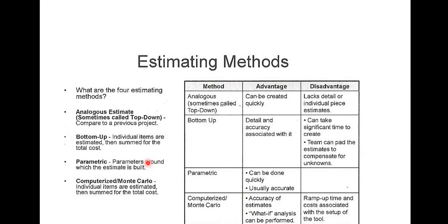Or if you are looking for someone to do some service for you on your project, let's say a tiler, how much do you charge to tile the floor per square meter? You know that already. Once you get that, you can multiply it by the square meters you need to work on, and then you have the answer you are looking for. It may be less than that, based on discounts for bulk purchase or so.